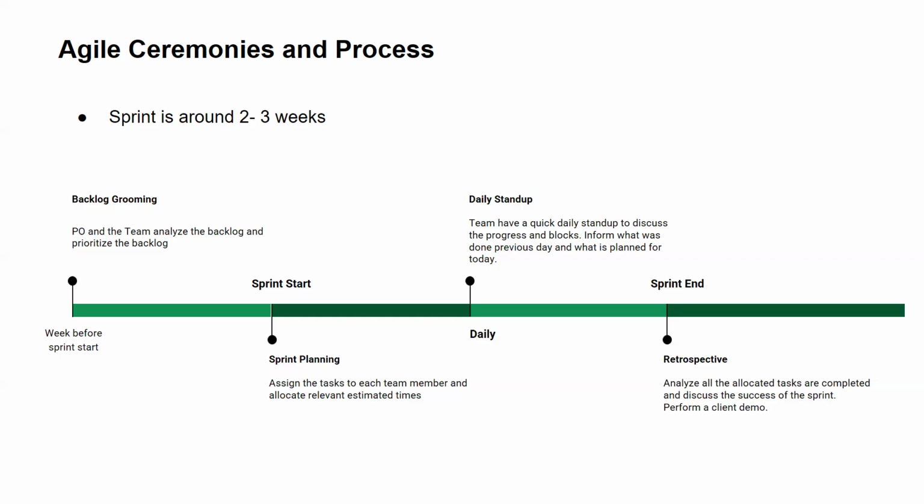Methods for how we can resolve these blocks should be discussed outside the daily stand-up, in a separate meeting. During this meeting, we are saying, I completed this yesterday, and I'm going to do this today. That's the high level thing we should be focusing on during the daily stand-up, right?